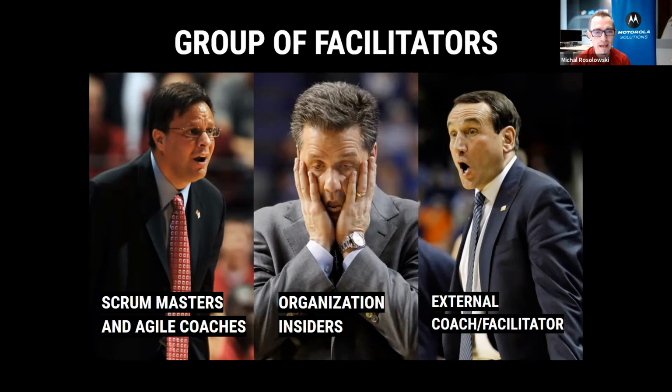I realized that it was a good idea to employ somebody from inside the organization, because it reduces the gap and it reduces the fear between yourself facilitating and the people playing the retrospective game. If they see their fellow insiders playing the same game or facilitating it with you, they gain more trust.